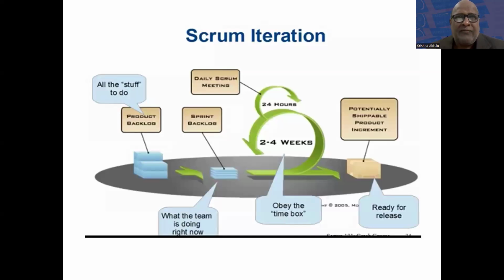Like any product, when a customer gives it, there's a Scrum role called product owner. He is responsible for the product backlog. He takes the requirements and puts them in a database, and he will prioritize which tasks are to be delivered first or something like that. From the master database, we will take like three or four items. They are called user stories. Right now, we'll say small tasks. Then generally in Scrum, they call them user stories.